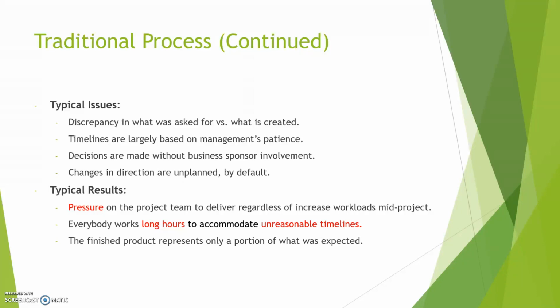Decisions are made without business sponsor involvement. In other words, yes, you need to cut back on what you're going to work on. What do you cut back on? Well, sometimes it's made without even asking. Changes in direction are unplanned by default, meaning that the whole thing is set up based upon a delivery being made at a certain date. The planning is such as though we don't expect any changes, but we know that there are changes. So this results in pressure, lots of pressure on the project team. Everybody works long hours to accommodate the now unreasonable timelines as things get added to the project workload. And the finished product only represents a portion of what was expected.